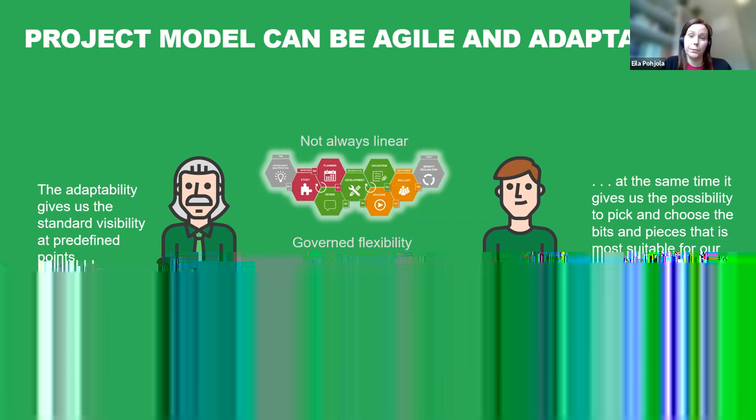So for us, we are adopting the agile way of working, very much, as I say, off the shelf from BTS. On the right hand side, waterfall in inverted commas continues, but we have declared our intention to adopt the BTS templates as soon as we reasonably can. And they have a weekly project review board cycle that Nick Leake, the CIO, chairs. But on the agile side, we come back together at a senior level for a quarterly steering view.